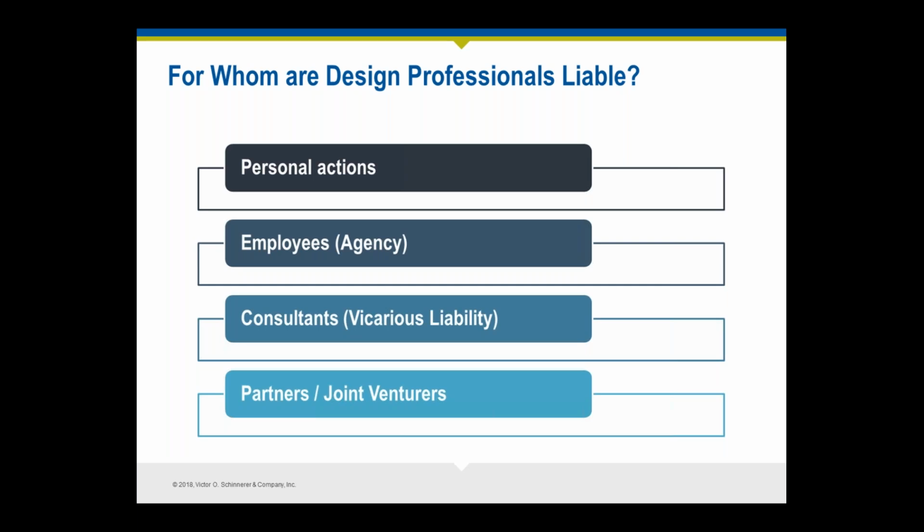Another issue that we sometimes see when you hire subconsultants is the contracts have to be coordinated. I would strongly recommend not allowing your subconsultant, for example, to limit their liability to you unless you have a corresponding limitation of liability with your client. Because what can happen, and again, this is very state specific, it depends on the jurisdiction and whether they uphold statute limitations of liability in contracts, but I believe most states now are upholding those.